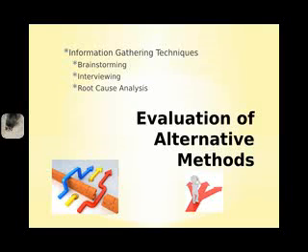This process is done in a group setting, which could negatively affect the generation of ideas because participants cannot anonymously contribute. Interviewing is another information gathering technique. Interviewing involves sitting down with experienced project participants, stakeholders, and subject matter experts to identify risks. This process is time-consuming because coordinating schedules can be difficult.